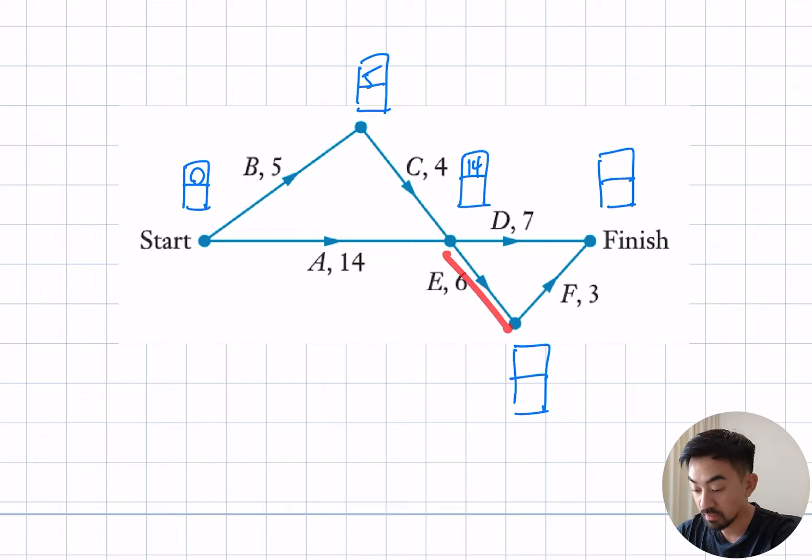Now we need to move down here. So it's going to be 14 plus 6, that's 20. Now I need to make a decision again. Is 14 plus 7 bigger than 20 plus 3? Well no, because 14 plus 7 is 21 and 20 plus 3 is 23. So that's done there. Forward scan done.